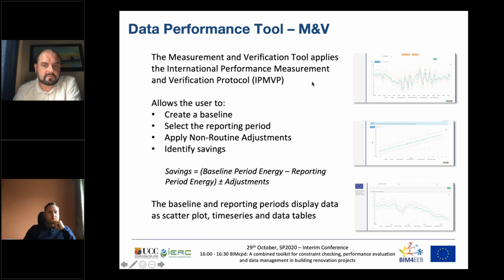As part of the data performance tool, we have the measurement and verification tool included, which will allow users to create a baseline before the renovation or before the application of any energy conservation measures, and then to analyze that data.